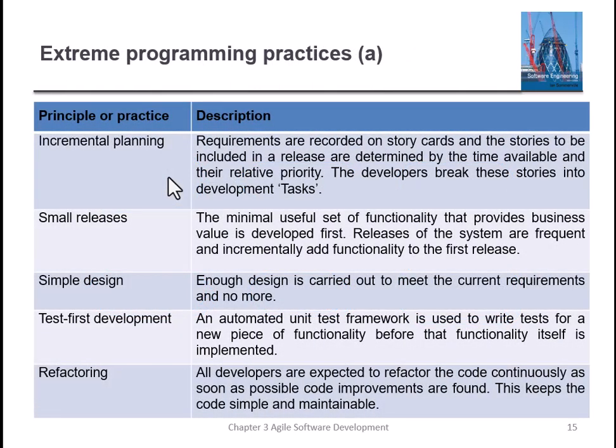Extreme programming practices, these are a few principles or practices. The first is incremental planning. The planning before your release or before development should be incremental planning. That means requirements are recorded on story cards, and the stories to be included in the release are determined by the time available and their relative priority.